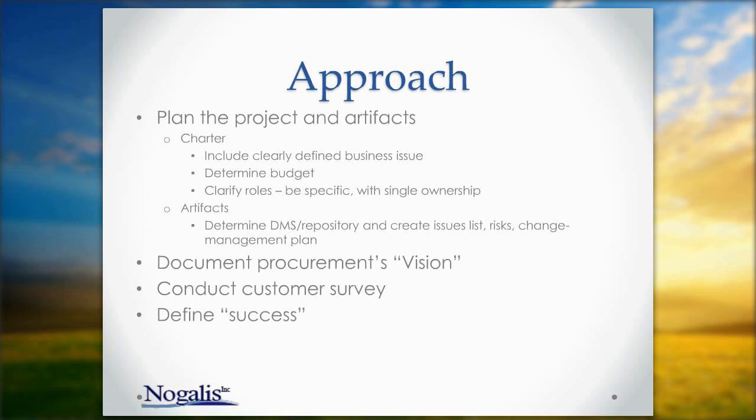So for the approach, work with your project management office to discuss the project requirements, what your organization requires in order to do a project and the required artifacts. A charter should clearly state the business issue and what the project is meant to resolve for that business issue. In other words, what is it that we can't do, that we should have, or that we have to do in order to accomplish what we need to do during the day.